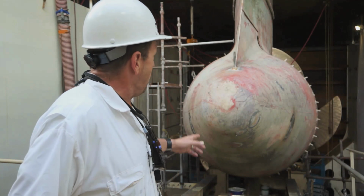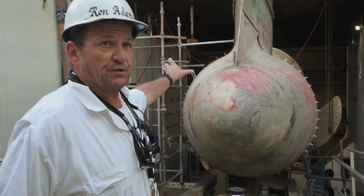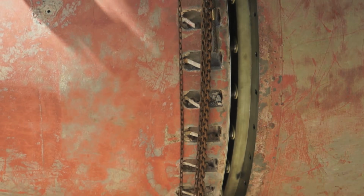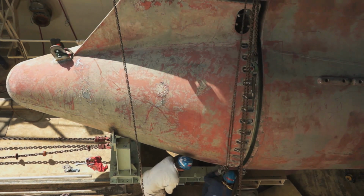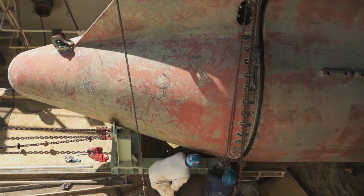Well, we're finishing up now with the buttoning up of the pods completely. We're doing the seal work, getting the seals in place. We'll put the rope guards on, the rope cutters. We'll put the concrete in the bolt holes. We're pretty much done. Clean up the cofferdams. Tomorrow we'll flood the cofferdams and we'll prepare for the vessel to sail on Friday.